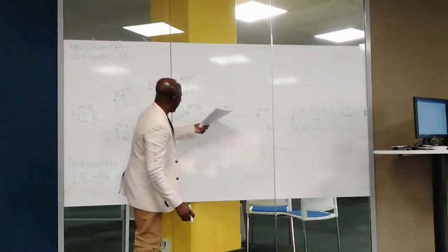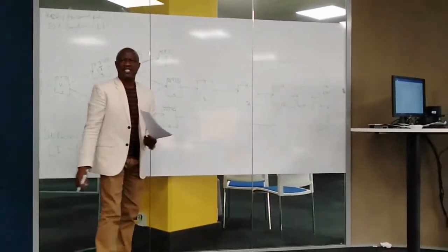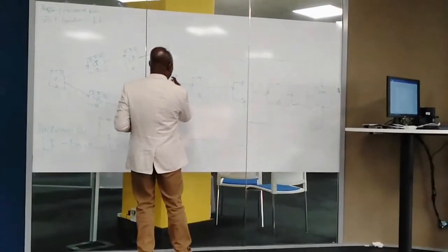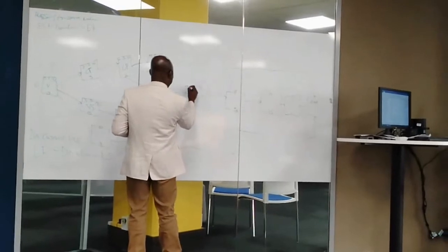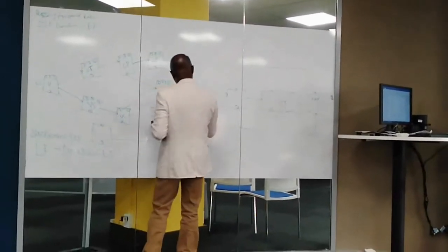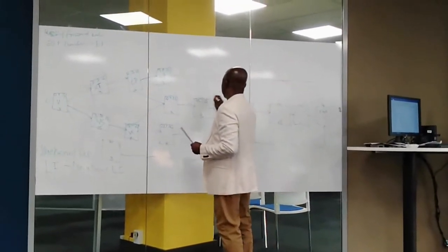Activity 9 can only start when activity 8 is completed. So now we're going to carry this out because it's the only one connecting to this. We're going to carry out 25 here. 25 plus 3 days of original gives 28. The days here are going to be 28.